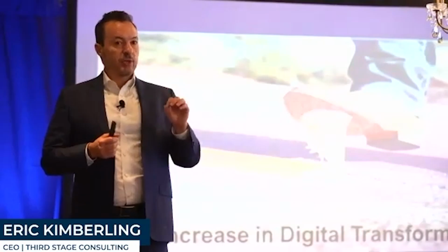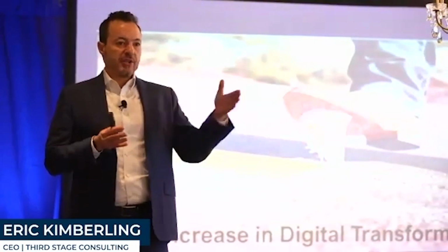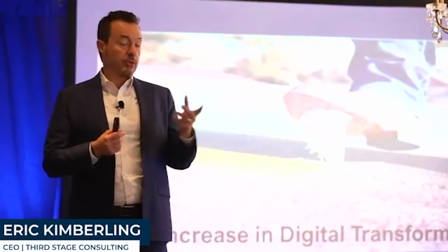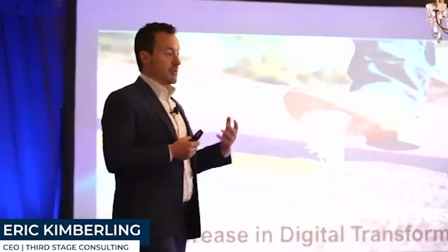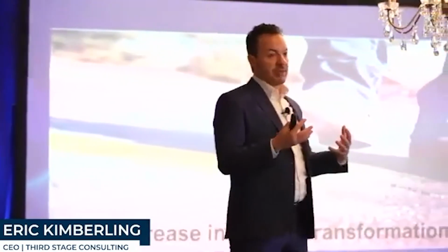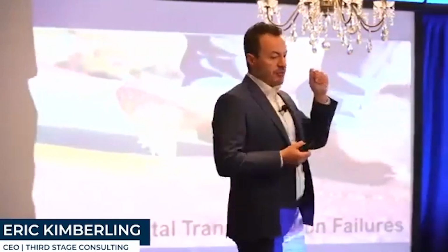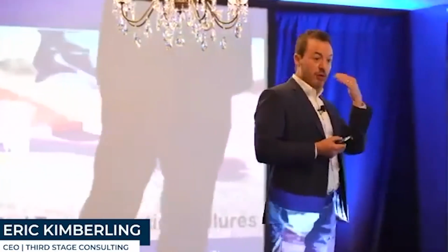That is a risk, but the bigger risk is that we as an organization can't change fast enough, and that becomes the critical path. How do we change our processes and our people to keep up with the technological change? That's what's driving a lot of failure. But the good news is if you address some of these blind spots and eliminate the blind spots, and you know what risk you're going into, that right there is a great starting point. Now you know what you're up against. Now you know that maybe it's not a 12-month implementation, maybe it's 18 months or 24 months. Or if it is a 12-month implementation, maybe the scope isn't as broad as we originally thought.